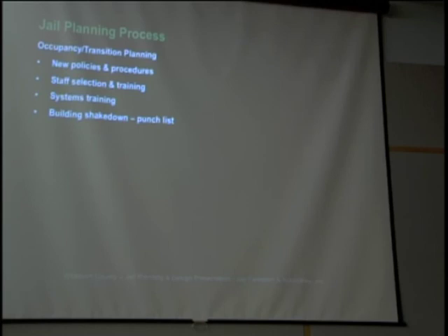The design and construction process of all the steps that we've talked about so far is pretty time-consuming. In a jail of around the scale of yours, I don't think it could be designed in less than about a year, probably a little more. Then if you go out to bid, you've got to advertise the bids, receive them back, enter into a contract. The construction on your project, I'd guess, would be in the range of a year and a half to two. I'm not sure. It depends on what the project is finally. But so you're talking a couple of years elapsed, at least, for that design and construction process once you have settled on what the project is.